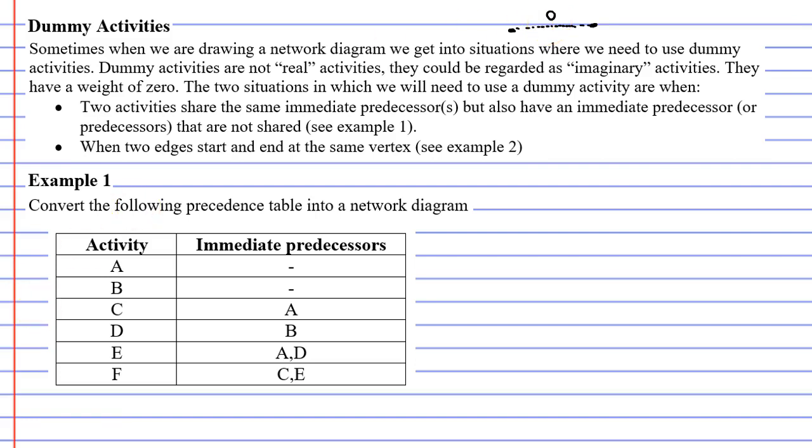There are two situations in which you might want to use a dummy activity. The first situation involves two activities that share the same immediate predecessor or predecessors, but also have an immediate predecessor or predecessors that are not shared.